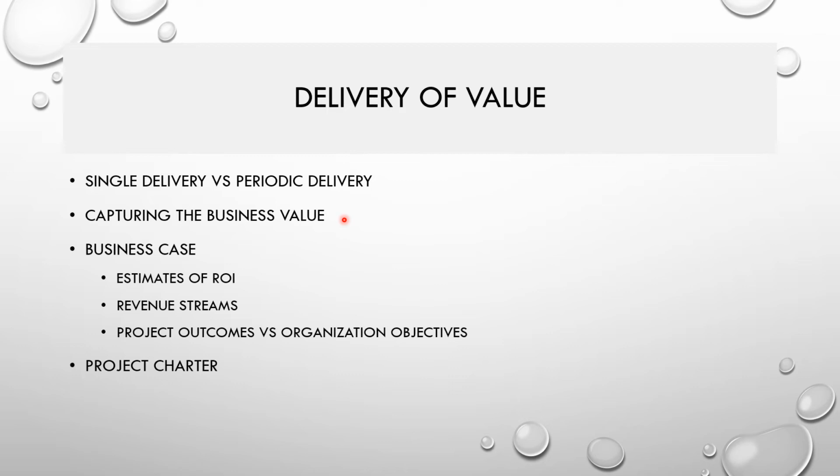The business case will demonstrate its estimates for return on investment. It will talk about what the estimated return on investment is, that you can compare with the actual return on investment. The business value is captured not only during the project, it will be captured after the project completion, so it will still be tracked, compared with the estimate of return on investment, even after 4 or 5 years. For certain projects like metro rail or highway projects, governmental projects, the return on investment will take 20 years, 30 years. So you need to capture the business value and compare it throughout the project and beyond the project's term as well.